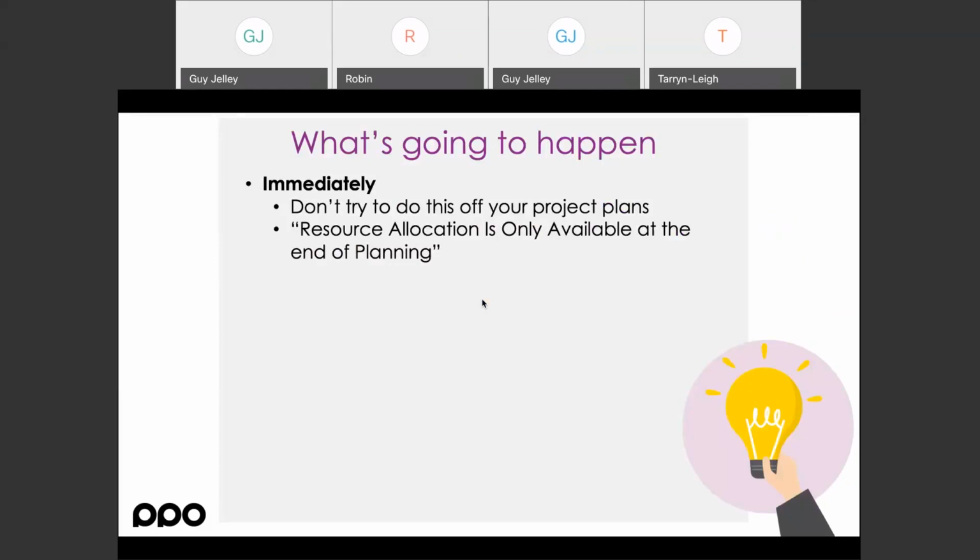So, you know, some of the stuff that's going to happen immediately is you're going to run into the whole thing of, well, we have project plans, and why don't we have this information available in our project plan? So I can tell you immediately, we tried to do this before. I've worked in this environment and space now for almost 20 years. You never, ever have a project manager who has a project plan which has a true reflection of timelines and milestones and commitments that have been made from a timeline point of view, as well as the full resource allocation. So trying to get that out of a schedule, trying to get a project manager to create a schedule that does all of that is something that takes a significant amount of time and maturity, and I've just found that most organizations don't have that.